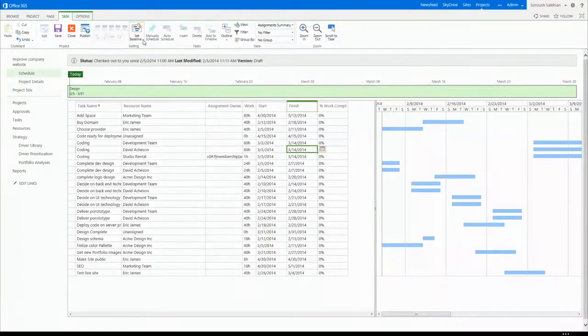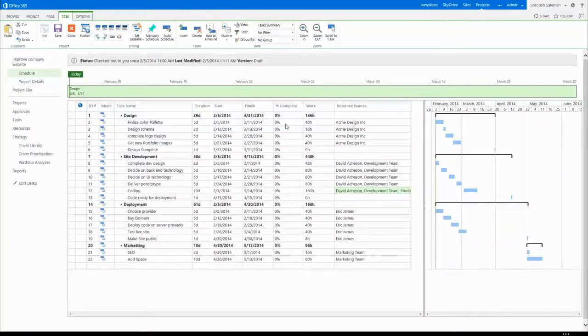And the other thing that we added here with having the schedule engine is that now you can actually start baselining your information. So you can go back to it and compare to that baseline, saying, how was it? We said it was going to cost $10,000. We're 2 weeks into the project. Where are we at? Is it still $10,000? Has that moved? Has it not moved? And so if I go back to the summary here, and if you start marking stuff off as complete, not only will they start reflecting here, but if I save and publish this,